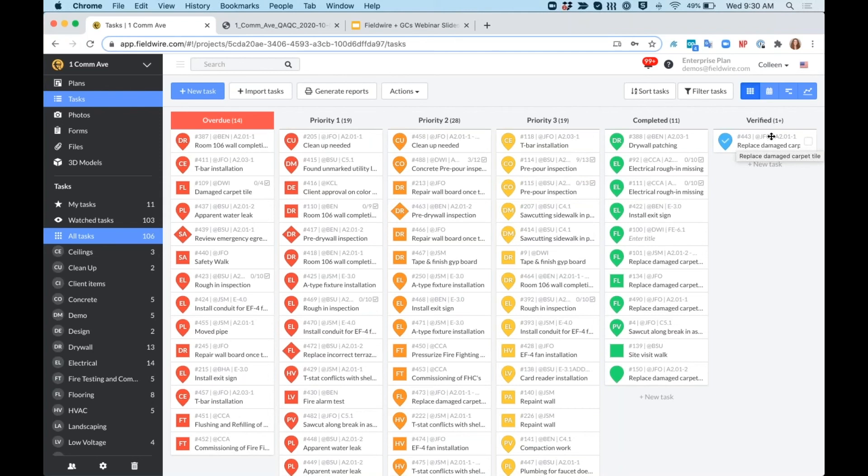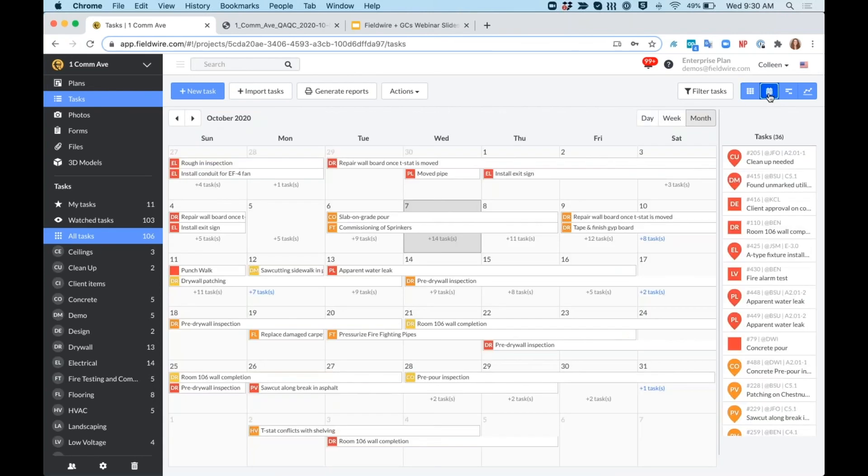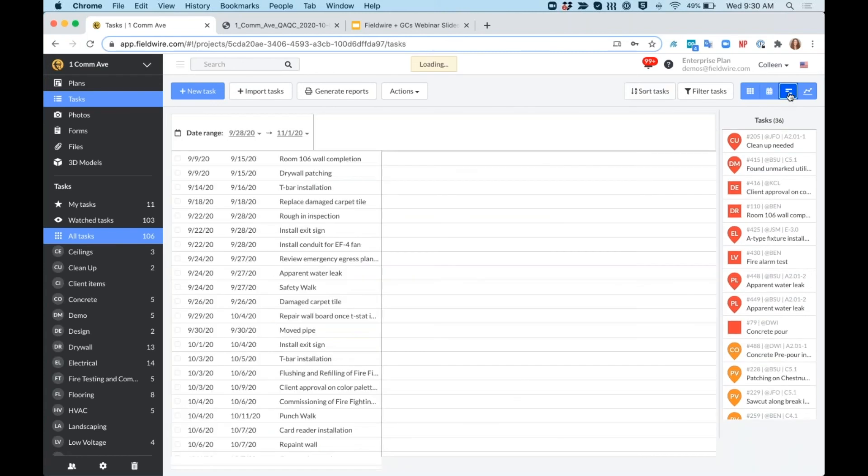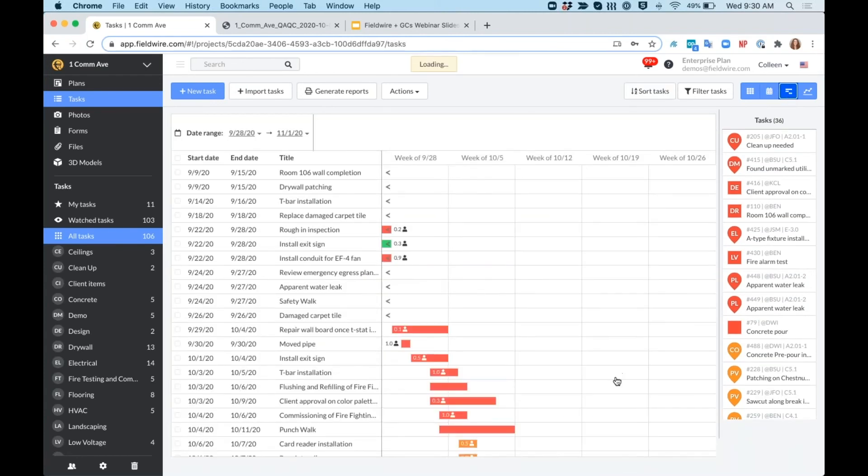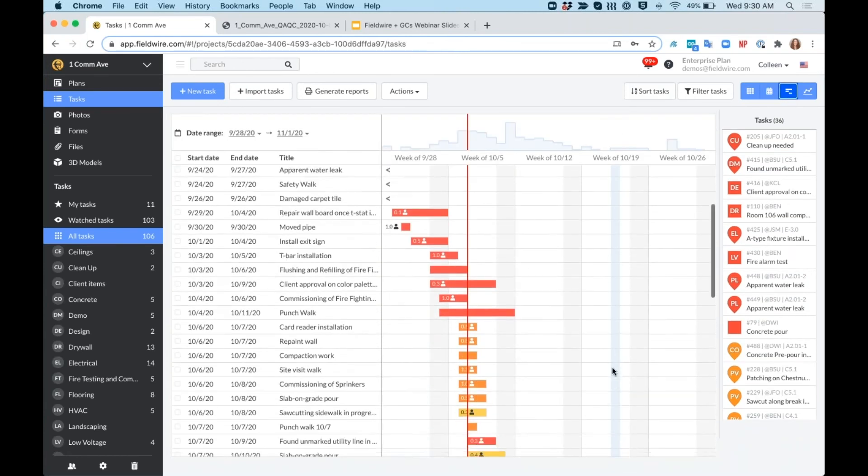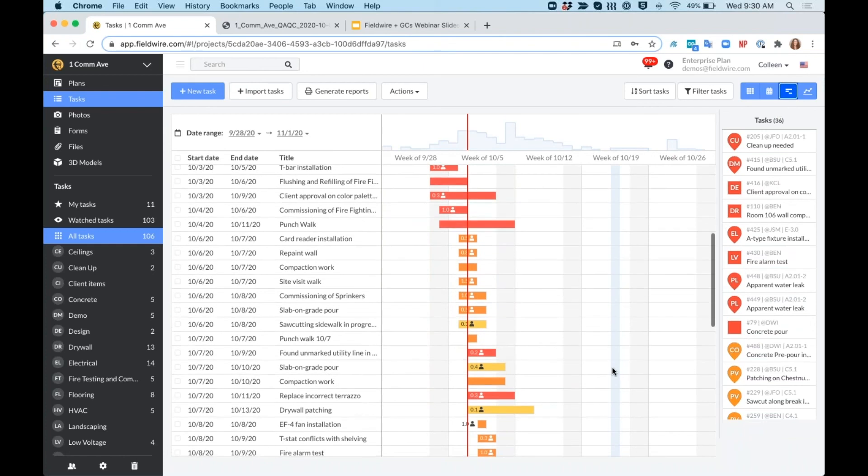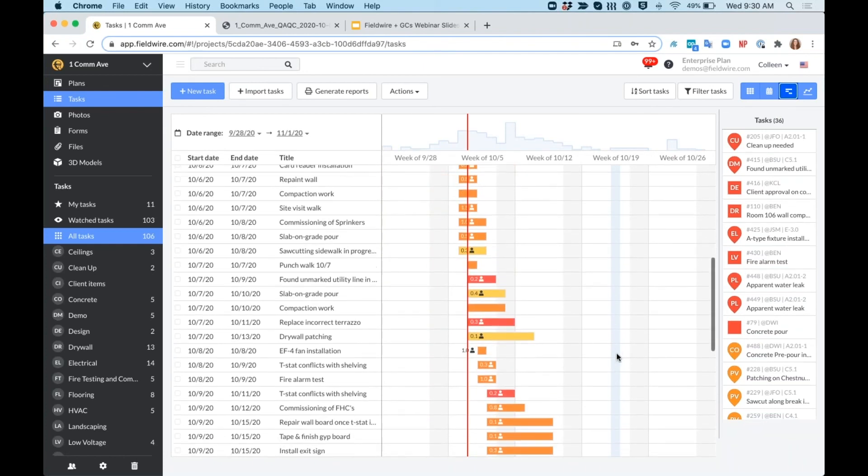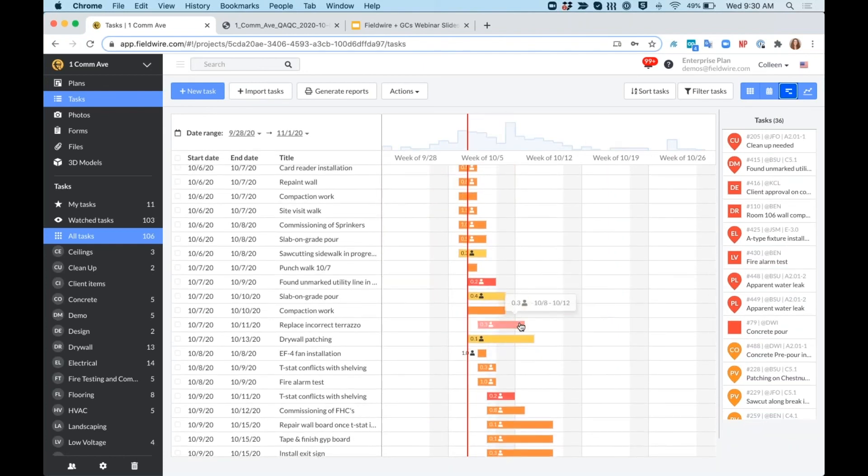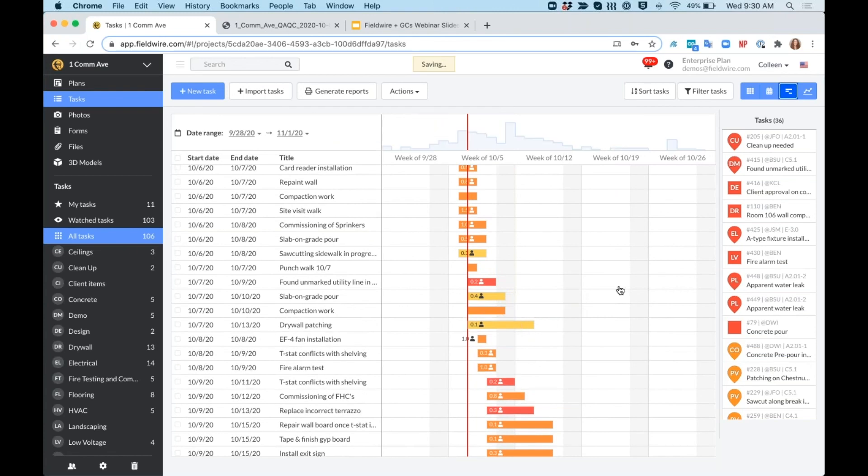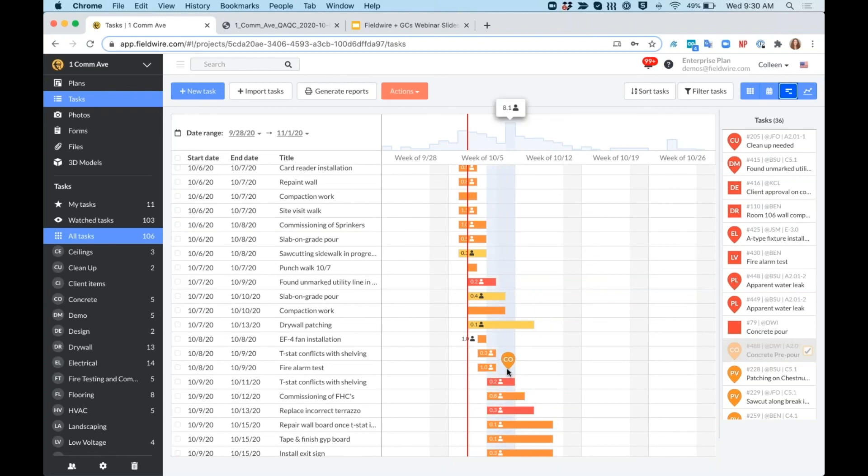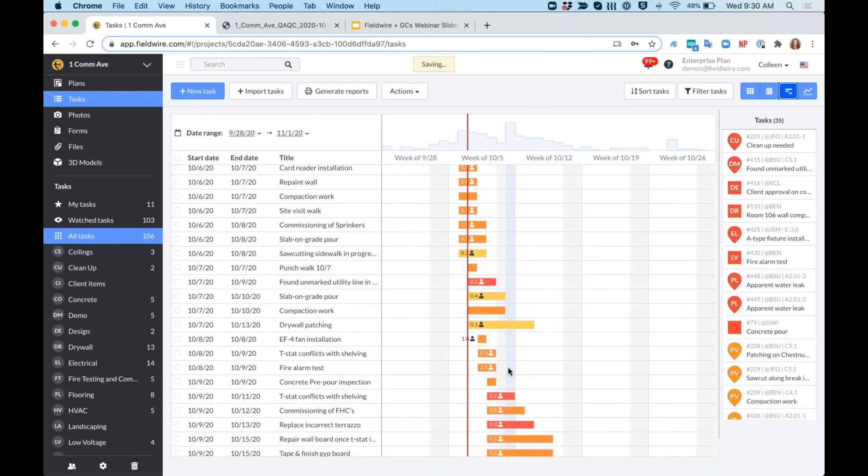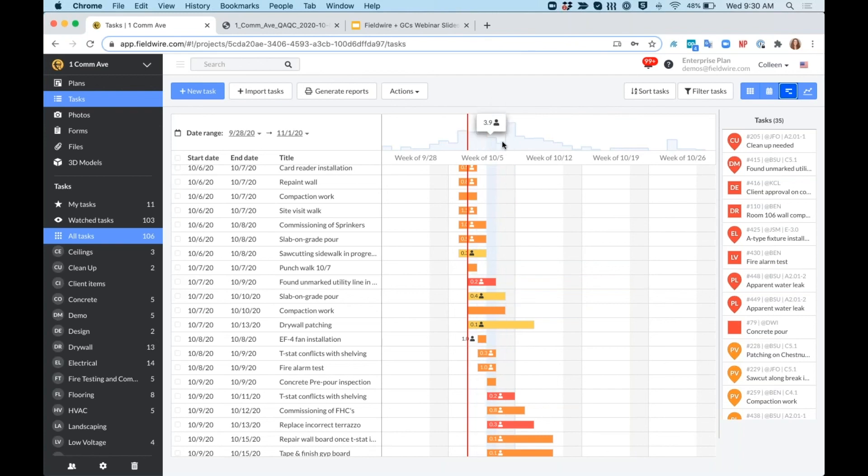We can also take a look at these tasks in a calendar view or a Gantt view. This Gantt view is really great for your sub coordination meetings. You can throw this up on the big screen while everybody comes into the trailer. You can adjust the start and end dates by dragging and dropping, and then you see tasks over here that haven't been scheduled out yet, where you can just drag and drop them right onto the Gantt chart. You can, if you're adding in that manpower field, you can see how many people you need per day on each task, as well as how many people you'll need total on site each day.